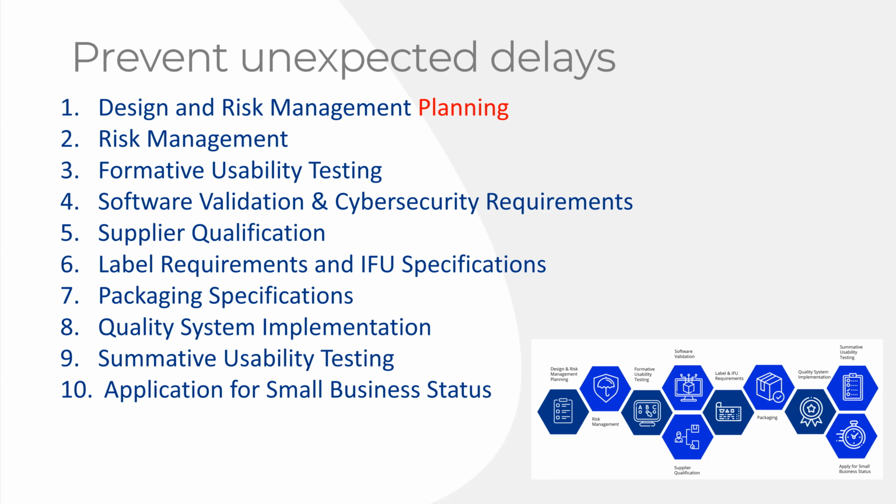Yes, you need a quality system. That's not an afterthought either. You should have design controls, risk management, software validation, and usability as your first 4 procedures. And then how are you going to review and approve those without a document control procedure? How are you going to keep records without a record control procedure? How are you going to demonstrate the people that performed all these tasks were trained before they actually started performing these activities? So you need document control, record control, and training.